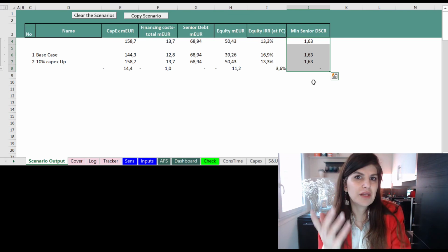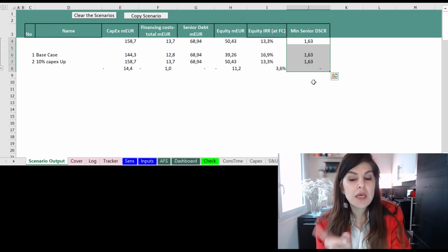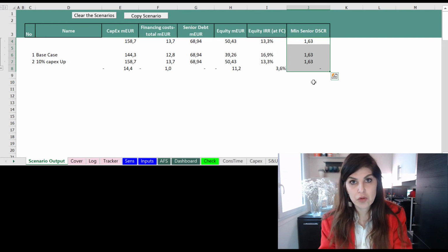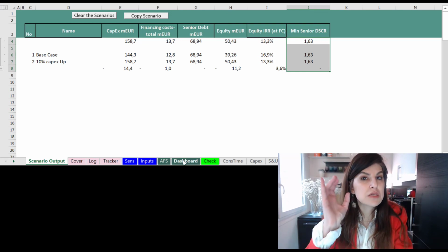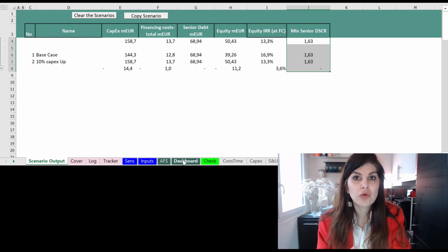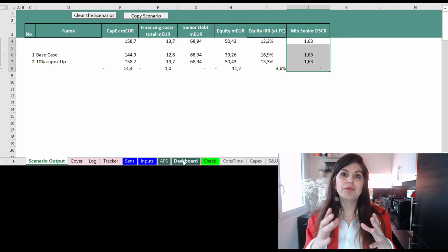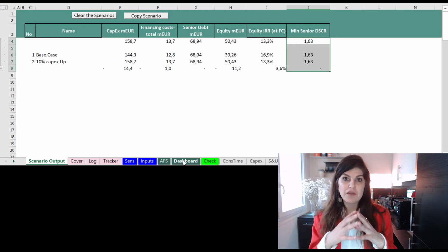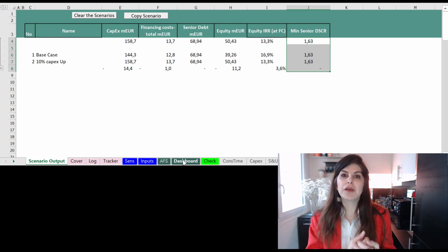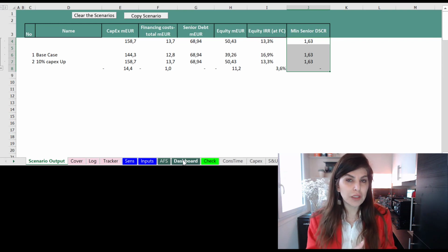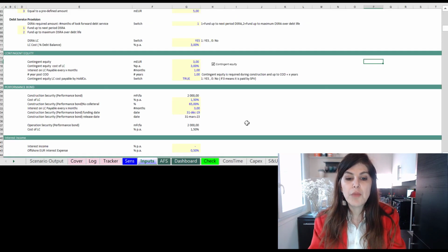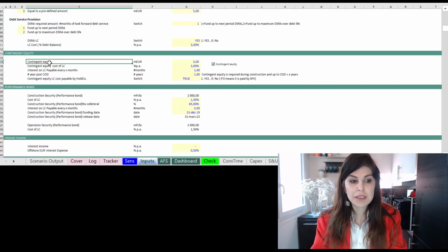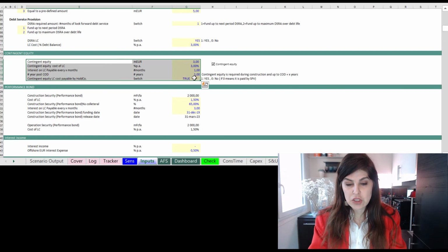So it's not really affecting the ratios, but it's really hurting the equity. So if there is any cost overrun beyond that, that's why it is so important for the shareholders to remain in the budget that they have estimated, because if they have to tap into equity, it is expensive and it's going to cost them a lot, right? So that's the importance of modeling it and showing the impact to the management for decision making.